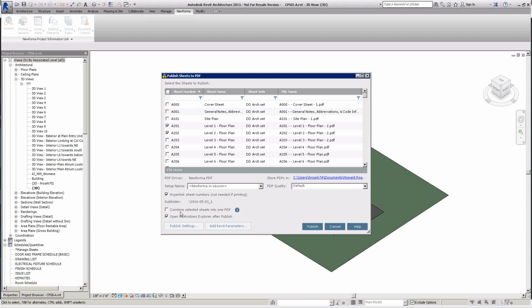But that Plans app does provide a means for you to mark up the PDF sheet in the field. That markup capability is only possible on a single page PDF. So if marking up sheets in the field is going to be important to you, then you probably want to make sure that the PDF you're creating is going to be a single page format.